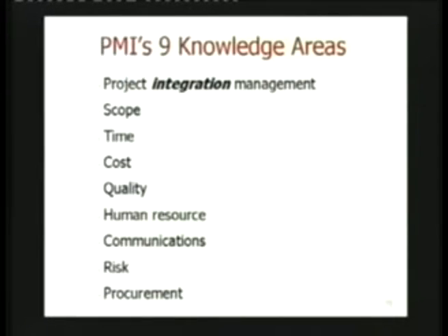The crucial thing is, yes, obviously we want the customer to be happy. If he has thought through his needs and wants those things changed, let him come through the formal channel. Because it might change the activities, it may end up costing more time, it may end up costing more money. Those things have to be approved again by the sponsor or someone he authorizes. So this is something we also have to keep in mind.